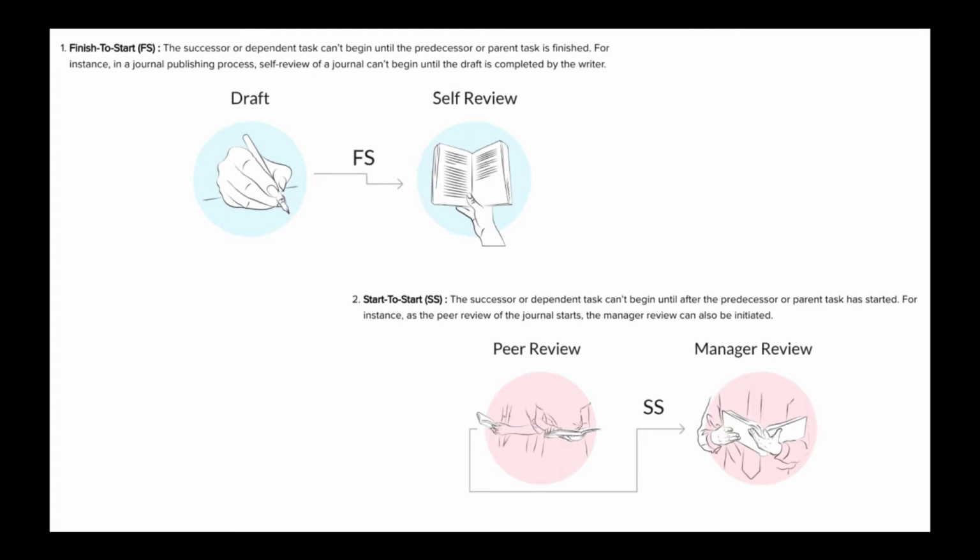And this can be done on the Gantt chart even after you've created all your task lists, okay? And if there's any way that this is not doable, the system will not let you create a dependency that it knows is simply not doable. So it will block you from creating any errors like that. In this case, the example is if you're publishing something, you can't do a review until a draft is completed. So the second one cannot begin until the first one is actually complete, okay? So that's how they're dependent. So you cannot start them at the same time.